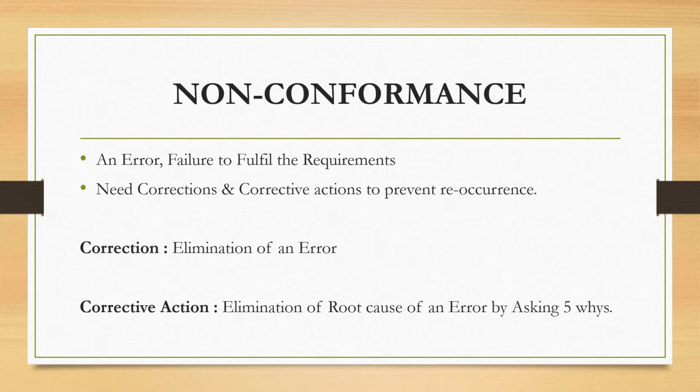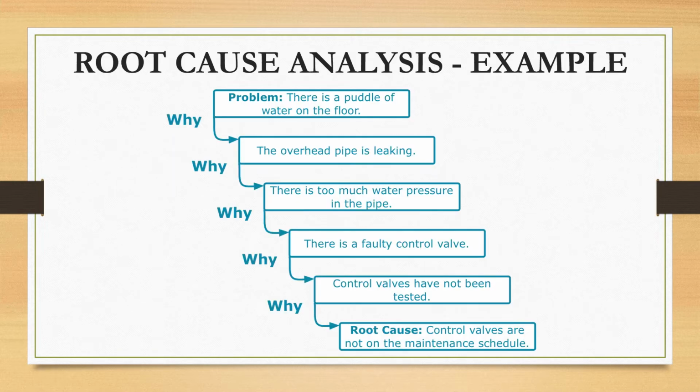It is very important in identifying root cause of the error because the corrective action is based on the root cause of the error. It will get by asking why question repeatedly 5 times. This is one of the example to identify root cause of the non-conformance.